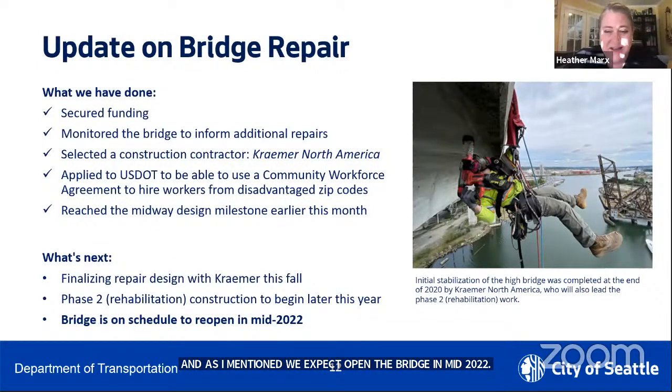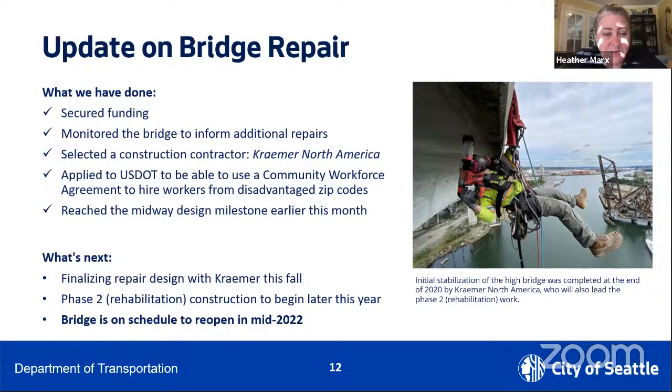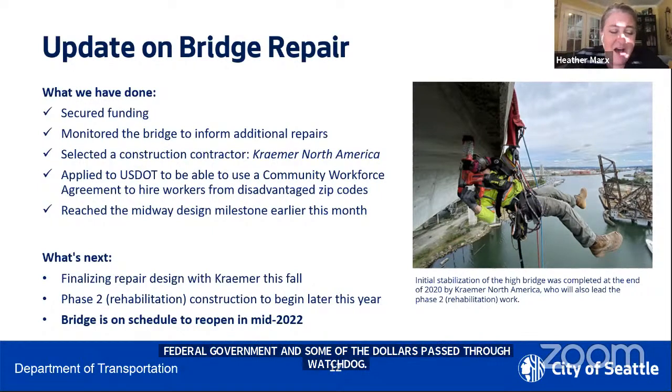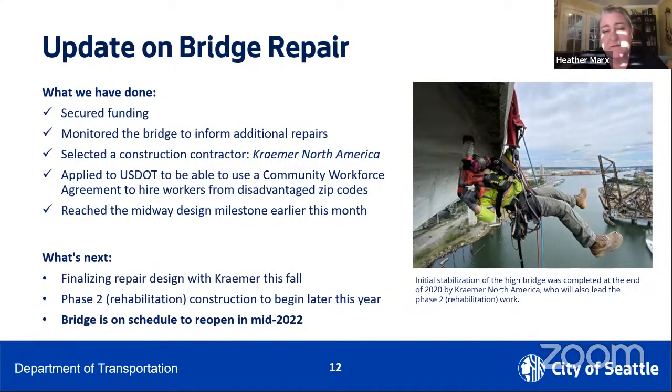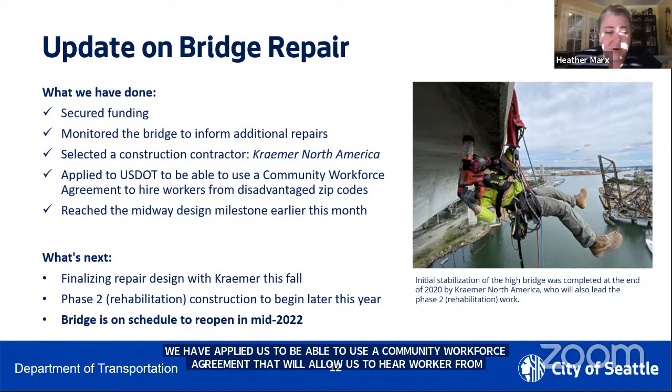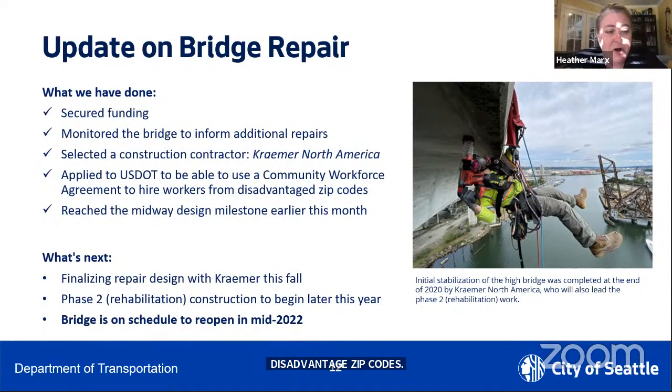So it's such good news that Deputy Mayor Mosley announced. We have secured significant partnership funding from the federal government and some of those dollars passed through WSDOT. We're also working with other local partners to secure additional funds. We continue to monitor the bridge to inform additional repair work. We've selected Kramer North America to do that repair work. We have applied to USDOT to be able to use a community workforce agreement that will allow us to hire workers from disadvantaged zip codes. That way we can bring the benefits of an open bridge as well as repairing the bridge to the community that it serves. We've also reached that intermediate design milestone earlier this month.